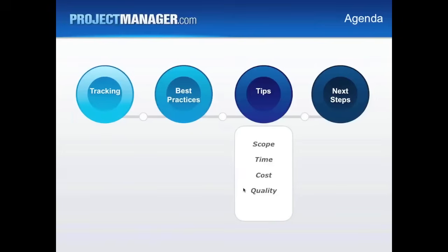board and help to get the change request evaluated and help the change control board know how this change is going to impact. Maybe it impacts the scope, maybe it impacts the timeline or the budget, or again the quality specs. Then the change control board has the authority to make the decision whether they're going to approve a change.